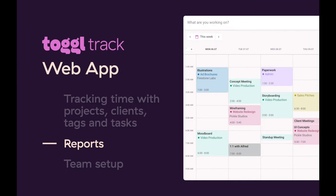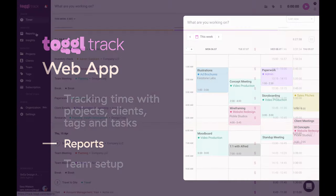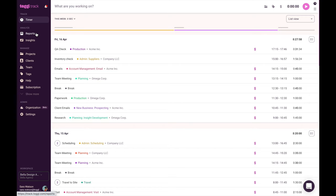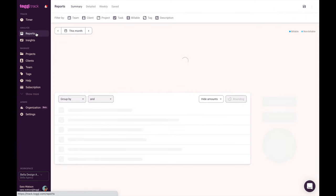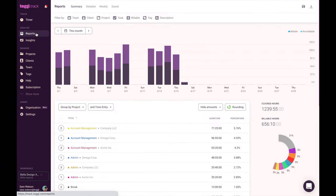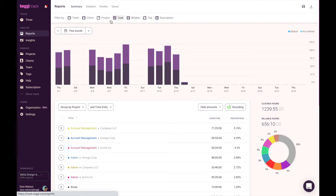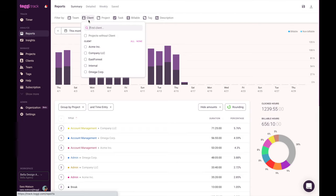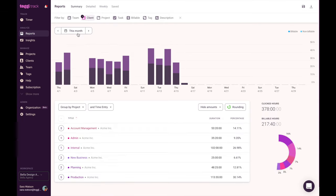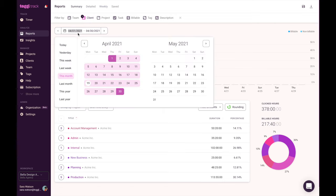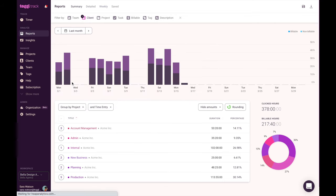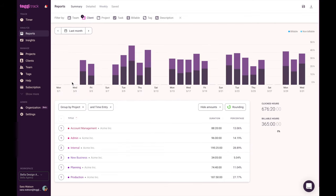Let's discuss creating a report. Click on the reports section in your menu. You'll have the option to filter your report by team, client, project, task, tag, description, or show only your billable hours. You can also choose a specific time period on the calendar, which will bring up all of your hours tracked during that period.